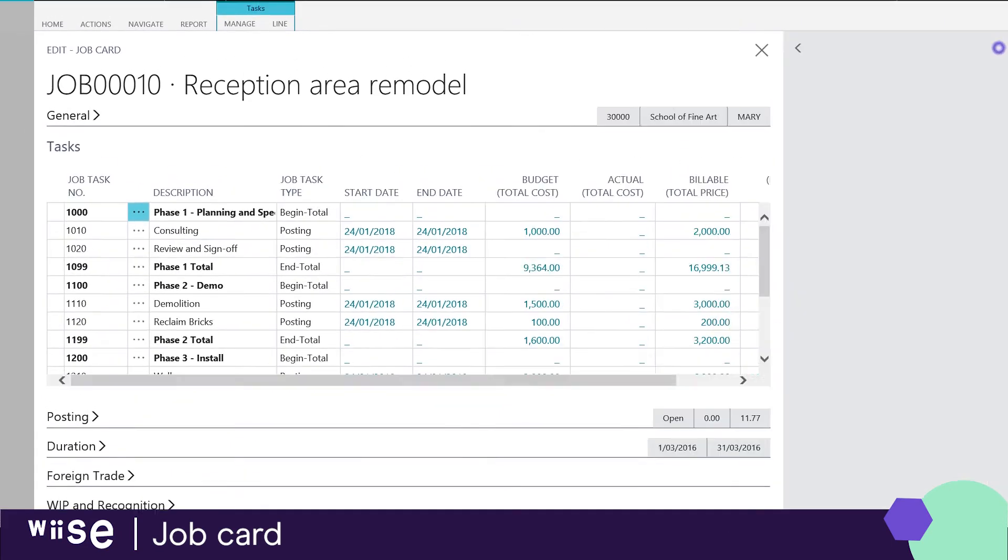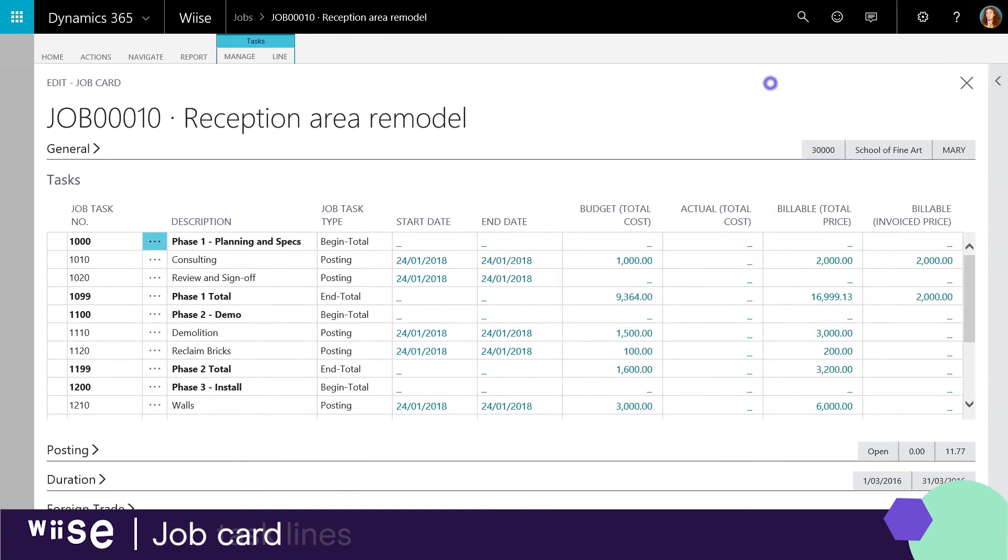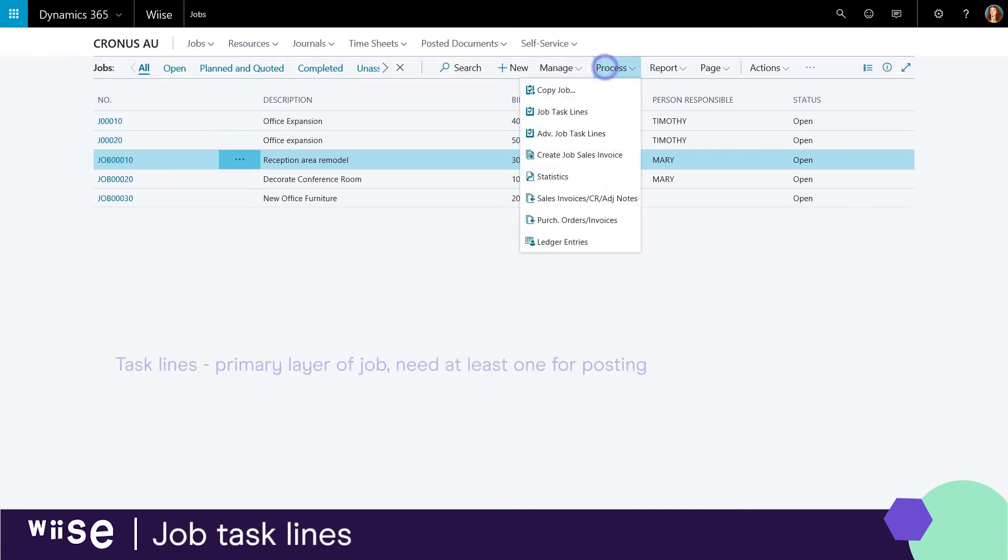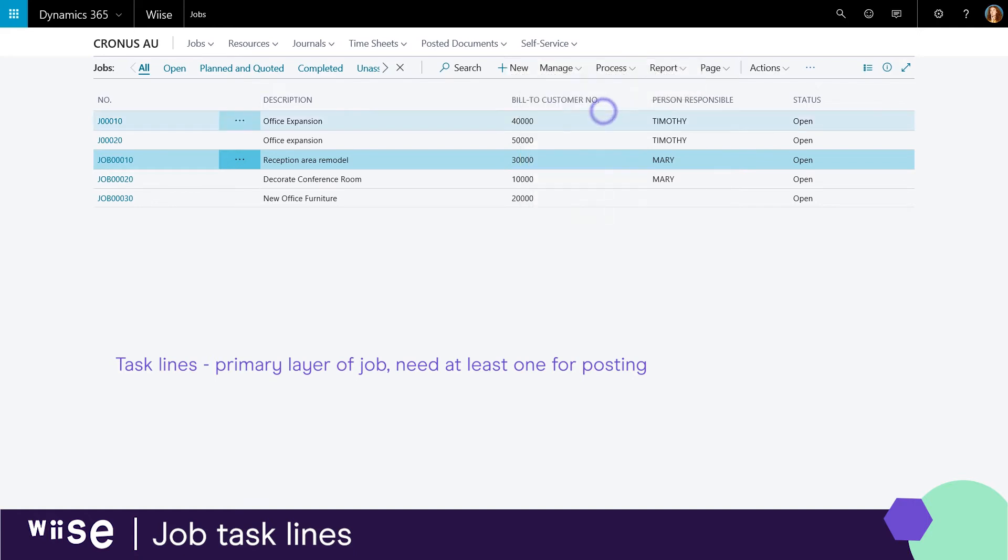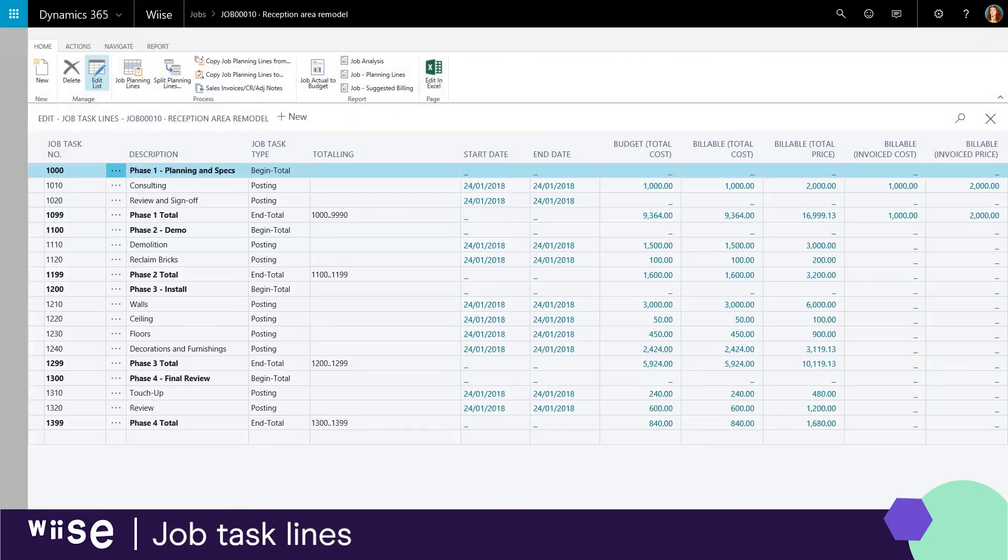The first layer consists of job task lines. It is necessary to set up at least one job task for postings to refer to. Having at least one job task in your project enables you to set up planning lines and to post consumption to the job.